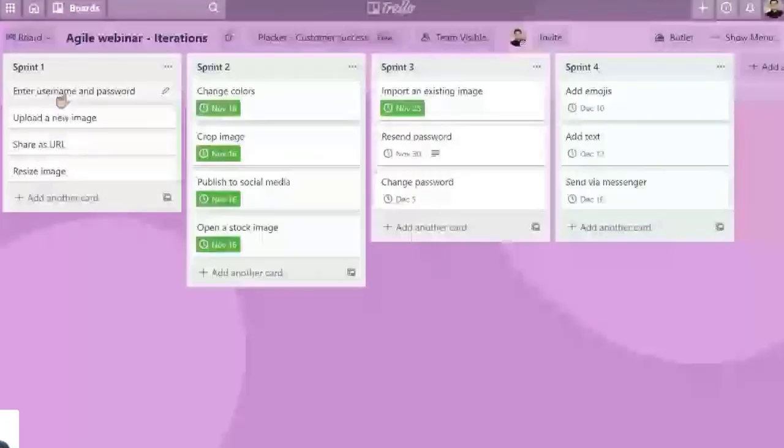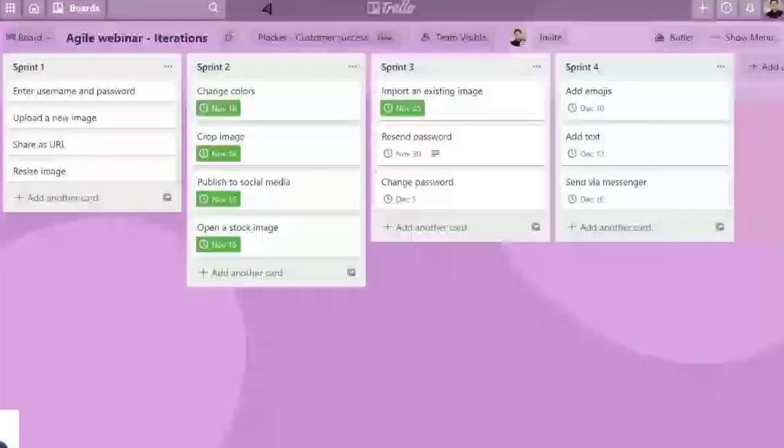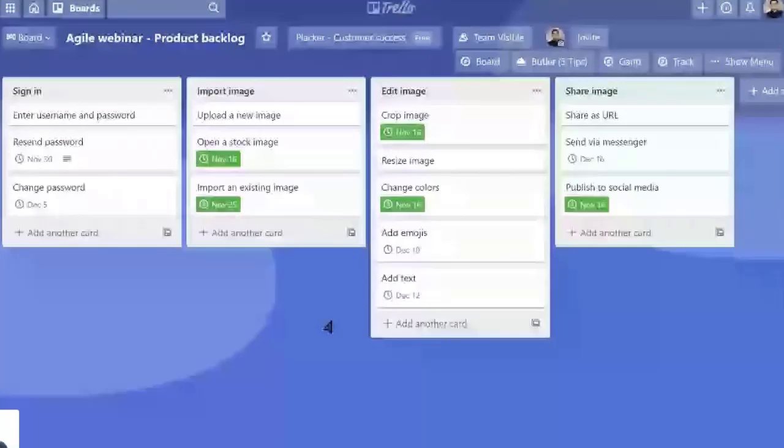So this is Sprint 1. This is what we were working on in Sprint 1, Sprint 2, Sprint 3, Sprint 4. Of course, you don't need to plan all your Sprints. That's not the idea. You're not going to plan everything at the start of the project as some other project management methodologies.